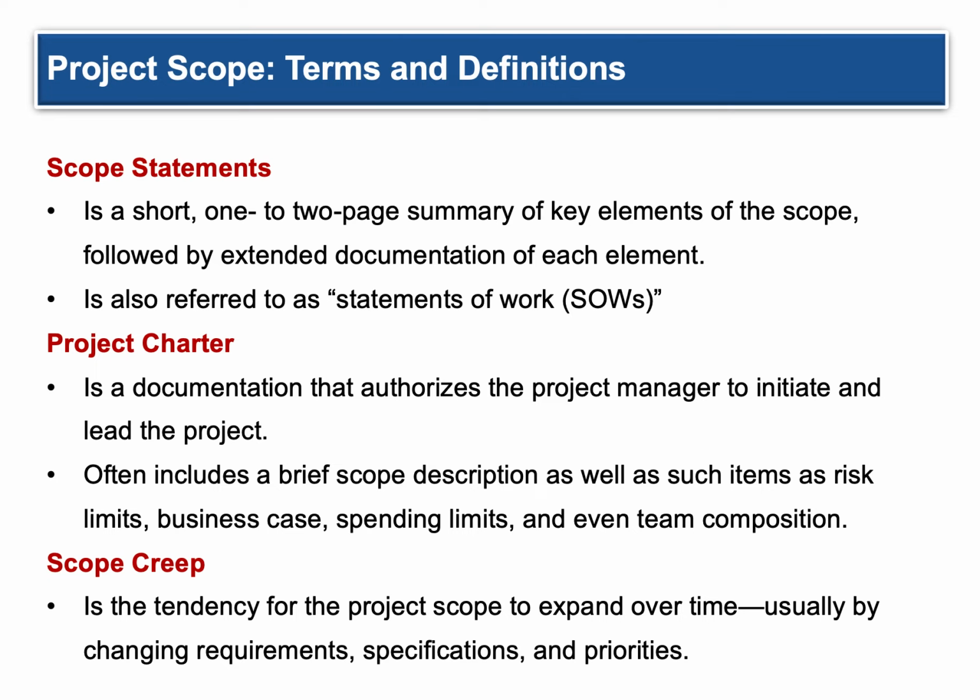There's a project charter. It's a documentation that authorizes the project manager to initiate and lead the project. We're just assuming you've been chartered to do this project in our class. We're mimicking what would happen in our corporate world. This often includes a brief scope description as well as such items as risk limits, business case, spending limits, basically some parameters from which you can do your project, including how you can compose your team.